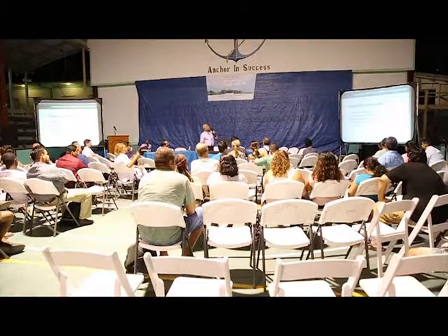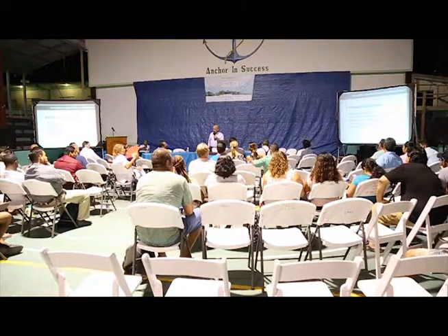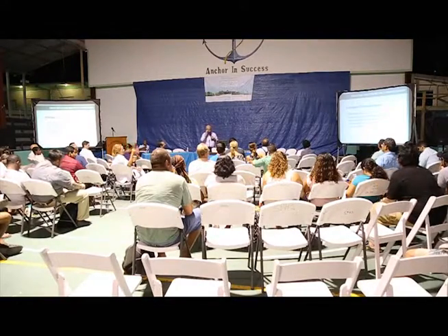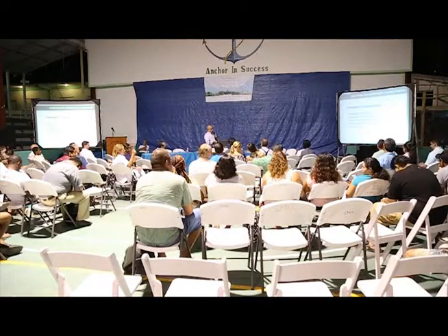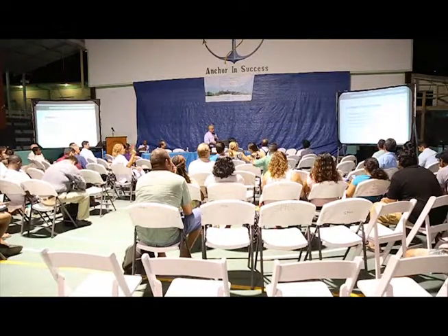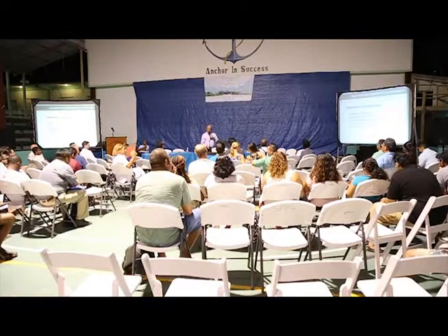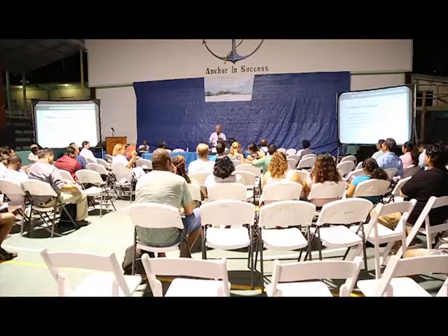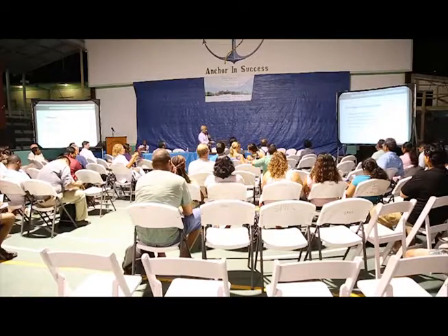Disaster and emergency management plans will be developed and implemented by the development team and will address the major disasters that can be foreseeable. Those plans will consist of and address specifics pertaining to responder training, coordination of training with local and national response teams, and site-specific safety orientation training for all workers. For those of you that have not seen them, those are big, thick, comprehensive manuals that provide a full emergency preparedness plan down to nitty-gritty details.